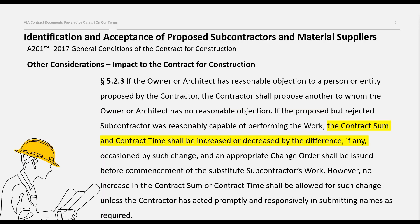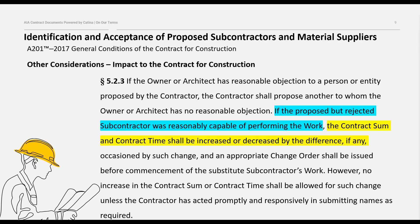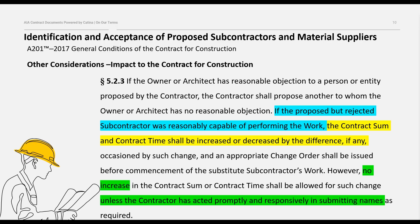Then, Section 5.2.3 recognizes that a replacement subcontractor may not be able to perform the work for the same price and within the same time schedule as the subcontractor rejected by the owner and architect. Because of this, the contractor is entitled to a change order to reflect any changes in the contract sum or the contract time. However, it's important to note that this entitlement is conditioned upon whether the rejected subcontractor was reasonably capable of performing the work and the contractor does not delay in proposing another subcontractor to whom the owner and architect has no reasonable objection.